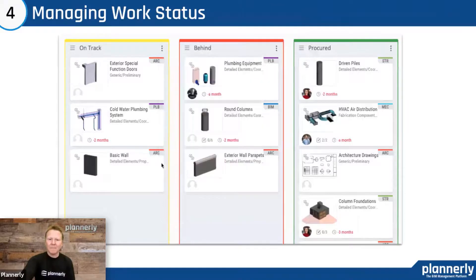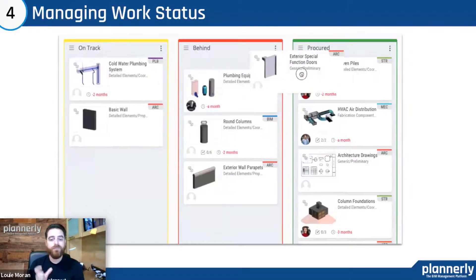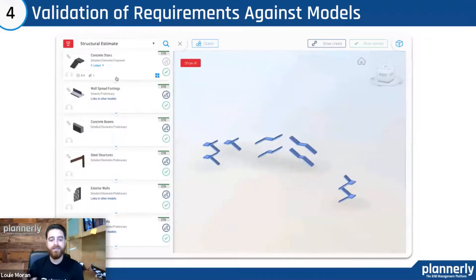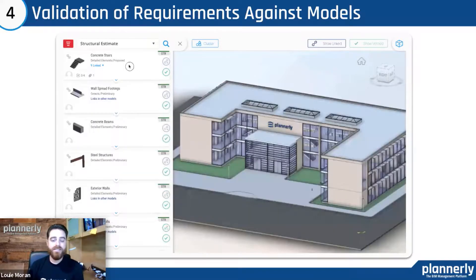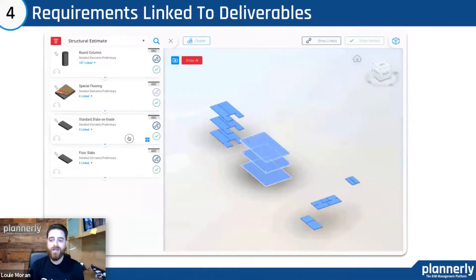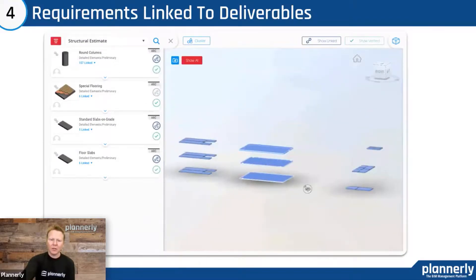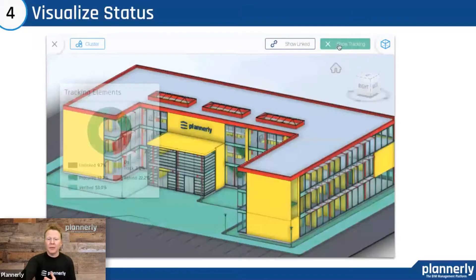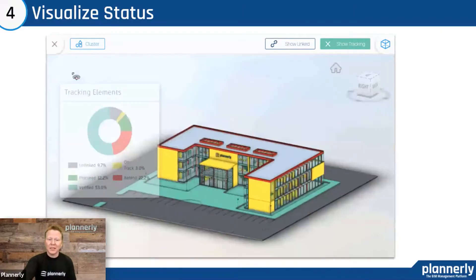Each team has a certain permission level so they can filter for their own scope of work and teams, see tasks within a certain timeframe, and make progress updates themselves. A modeler or someone editing the model would progress tasks to a point where a checker can verify the level of information need — all connected to the model. We have an integration with BIM 360, which helps ensure we meet expectations from the original document and produce better quality models. Linking requirements inside the same workflows is extremely powerful, and visualizing status — what is checked, procured, on track, or behind — is really important.